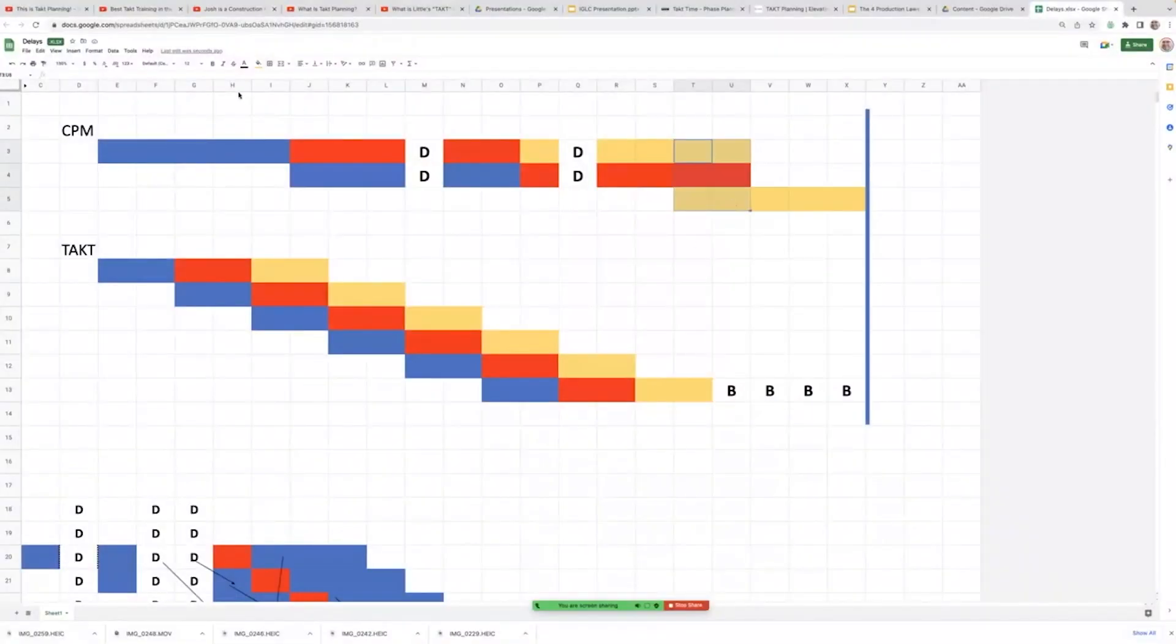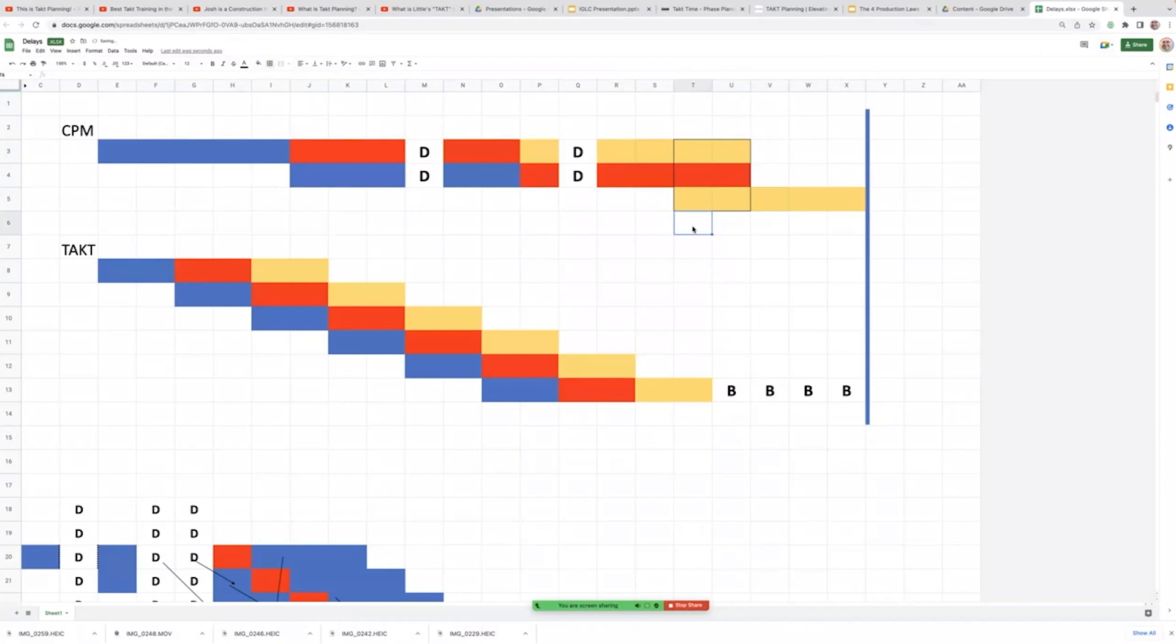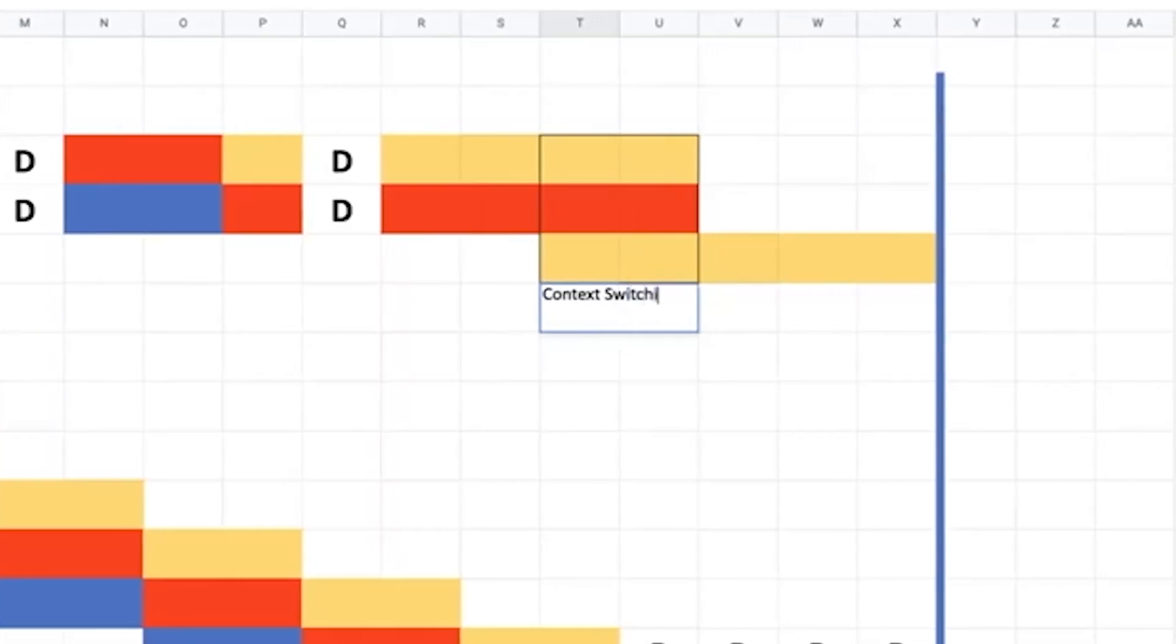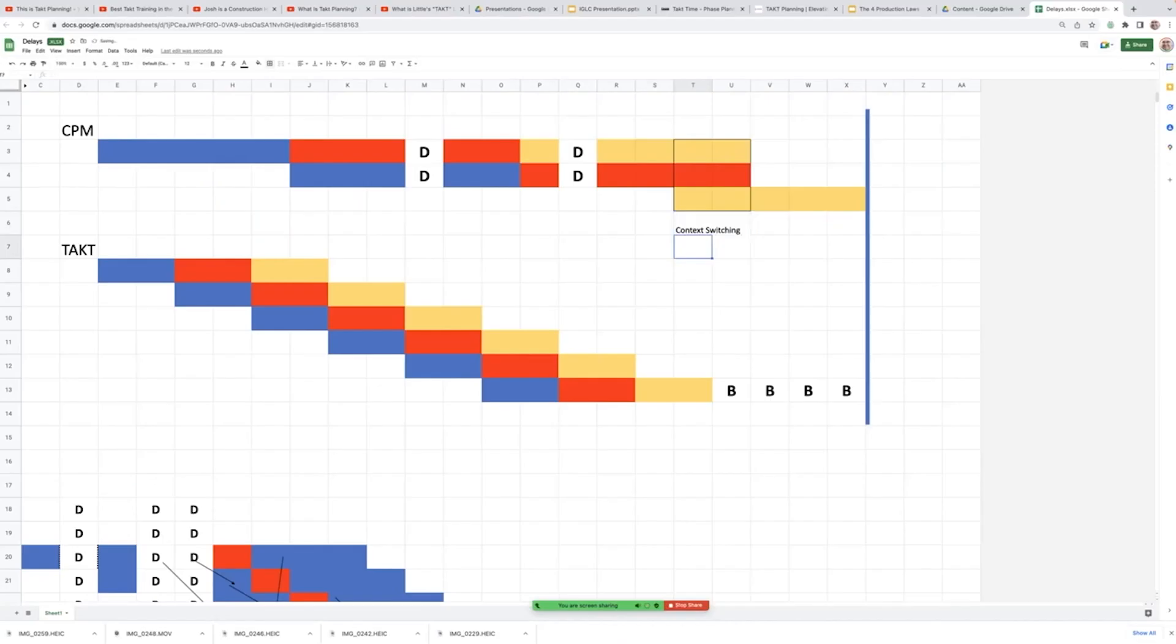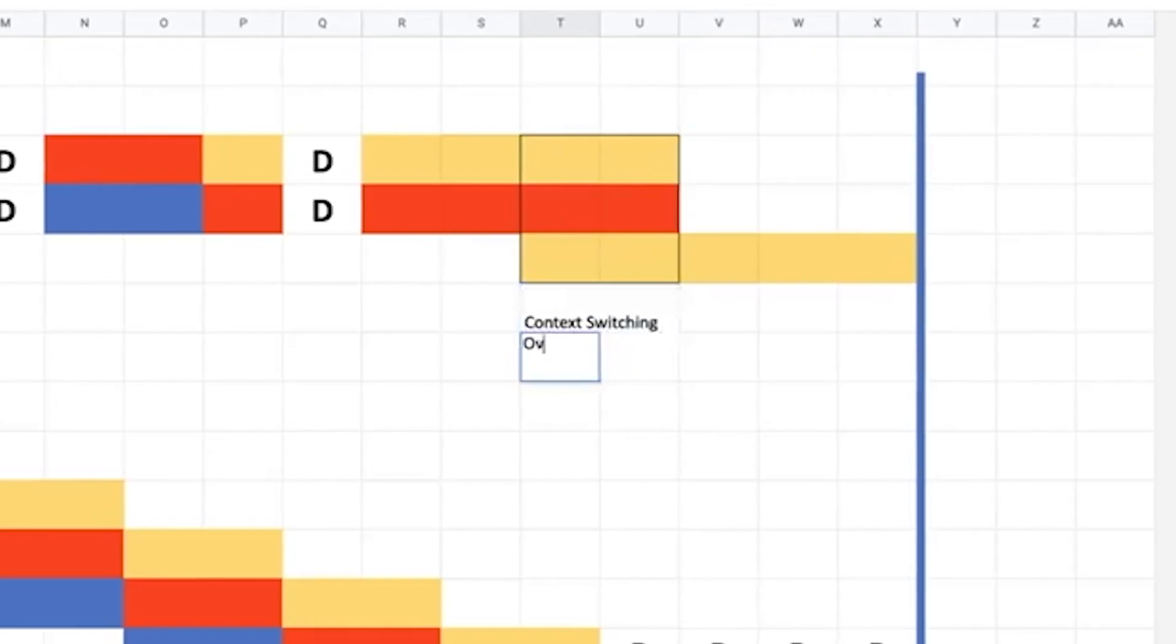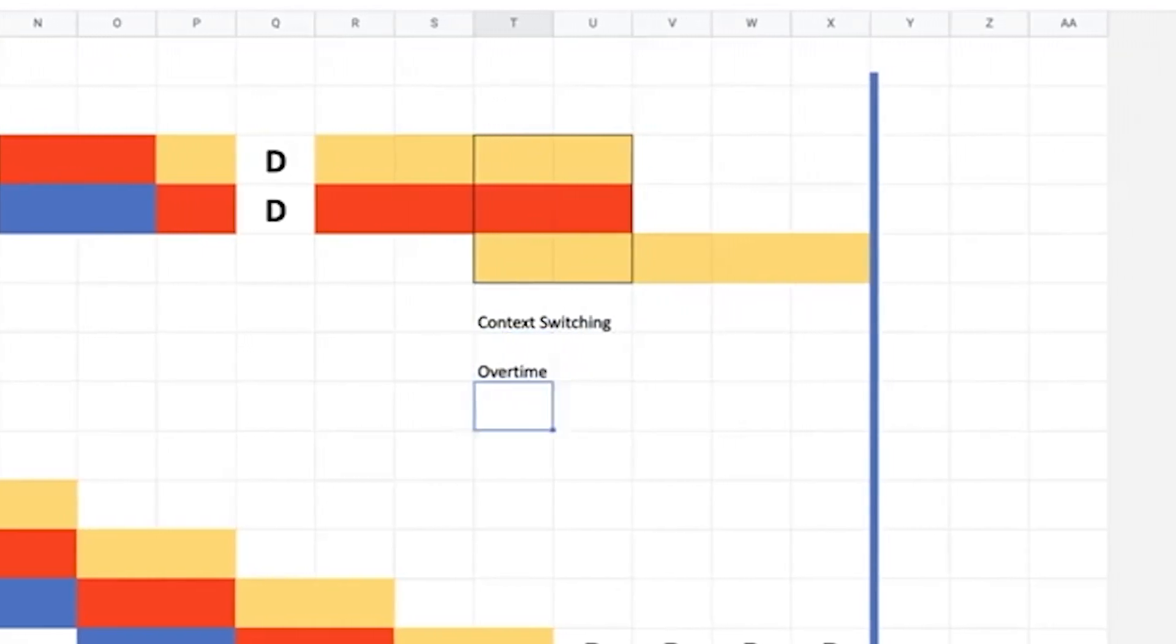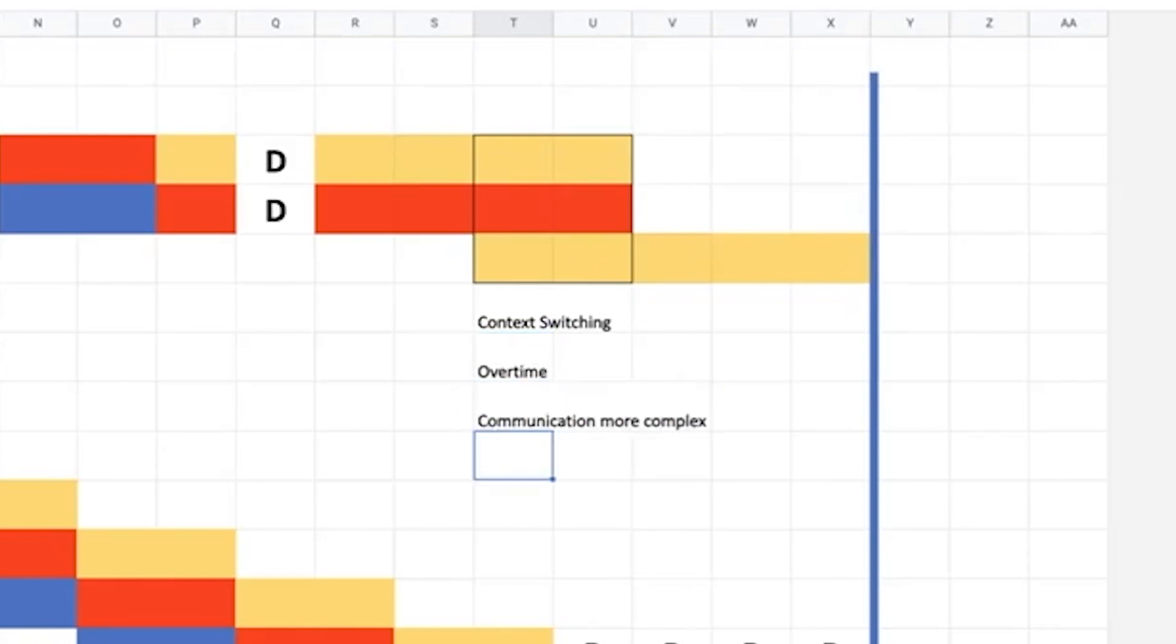So we have a problem here. Anytime you see that, this trade stacking, you're in trouble because as Philippe Engineer talks about in his Scrum courses, additional people means more context switching. Additional people means that you're probably also working overtime. It means that communication is more complex. It means that there's an onboarding time for new people to come on the project site, a minimum of seven days.